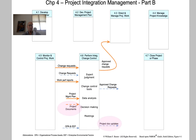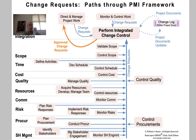Then we see these project documents and project documents updates. What's happening here is all of our change requests get logged. We don't see any explicit information flows to or from the change log — we read from and write to the change log through these rather subtle project documents and project documents updates.